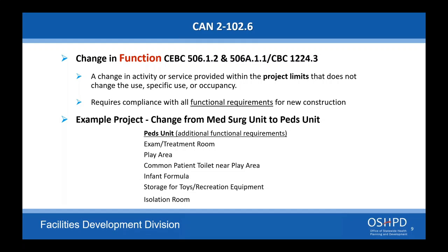Next question we have here: in a cosmetic-only restroom upgrade, wall tiles will be removed and replaced along with wall-mounted accessories. In-wall backing may be relocated. Will this require a permit? Yes. It's no longer cosmetic once you're opening up the walls and moving things around. So yes, it would be a project.